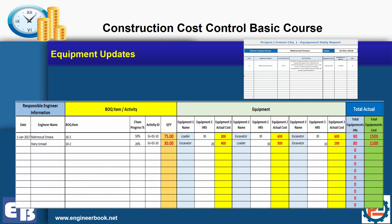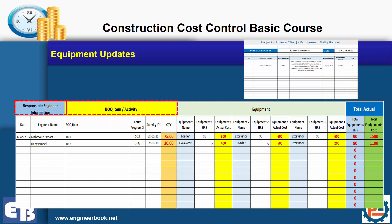We also have the equipment updates. From the equipment daily report, we can create updates just as we did for labor and materials. We have the engineer, the BOQ item, and the equipment used in this item. And of course we are going to calculate the actuals.